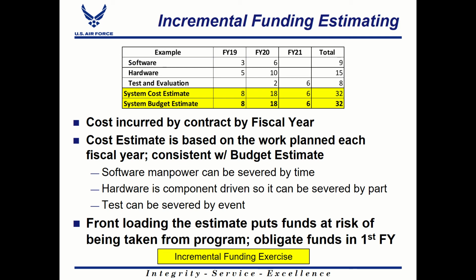So again, these different types of efforts can be considered severable. Software obviously is a manpower driven activity. You can sever the amount of time that people work on these things. Hardware, again, is going to be component driven or unit driven, developing subsystems or components, so you can sever those by parts. Testing can be severed by test events.